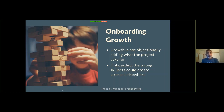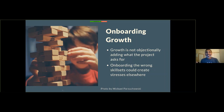A lot of times when people say they want these things, it's in addition to many other things they may want. If you onboard just that, or maybe the wrong skill sets, you're going to start seeing stresses somewhere else — like a Jenga board. If any of you have read the Mythical Man Month, you know that adding more developers to a project does not make the project go faster or more efficiently. It just adds complexity because there's so much more overhead generated. So this initiative is really about how do we build teams correctly, using data to drive that.